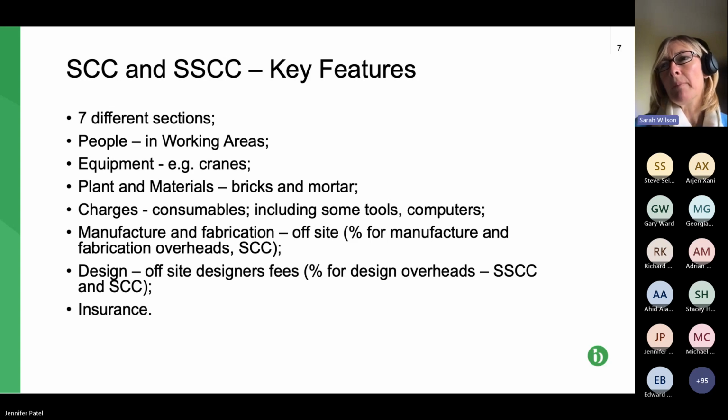I'd wipe that from your memory, really, because it is not talking about insurance premiums. It's talking about what happens if there is an insurance claim. The insurers make a payment. How is that money dealt with? So I suspect that is something that would be dealt with by someone else within your organisations. So wipe that from my mind, because I think it's quite dangerous, because personally I would just assume that it was relating to insurance premiums, and it's not. Next slide, please.